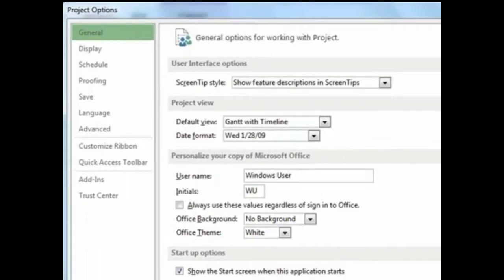Good practices dictate that setting the date format field in the General page of the Project Options dialog to include and display the time of day will make it easier to comprehend, validate, and/or troubleshoot the sum of durations for a sequence of tasks, particularly when durations include non-whole numbers, that is, durations with fractions.